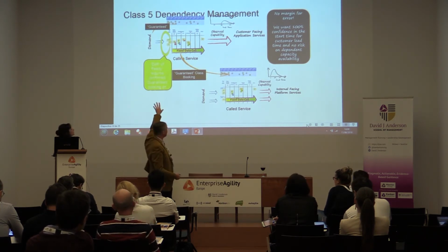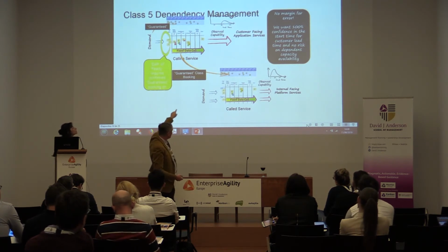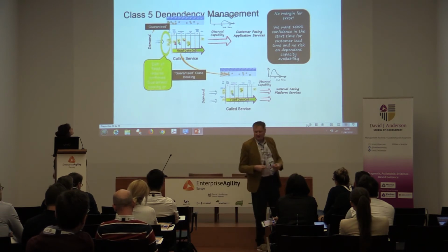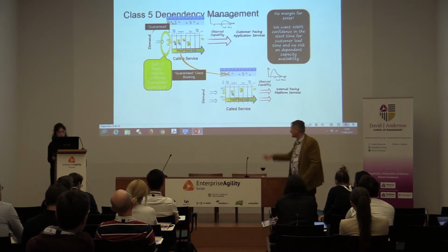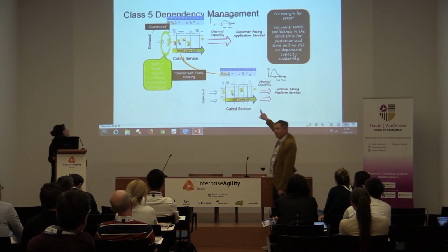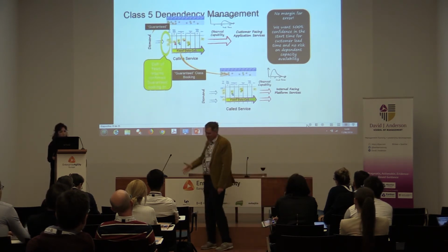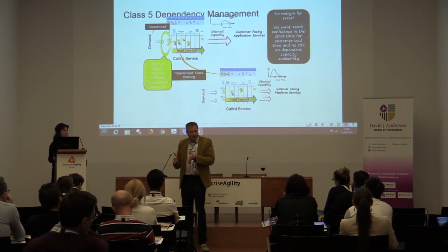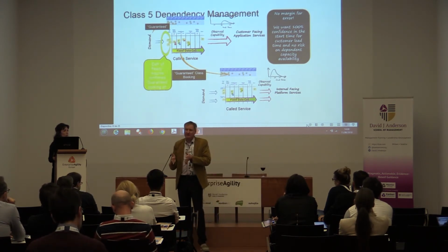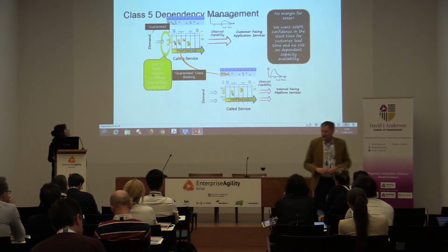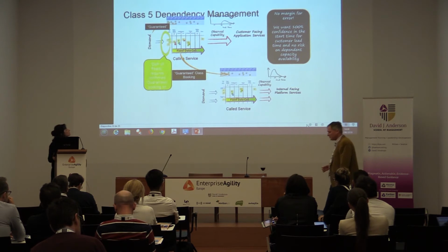So we have fixed class of service on the input, and that means that we have to cascade very high urgency, either fixed date class of service or expedite requests, into the shared services to ensure that we can hit the deadline. If there's a lead time distribution for this customer-facing service, we need to be at this end of it, the left-hand end. You need to process it quickly. So 5 different classes of service, different ways of doing dependency management.